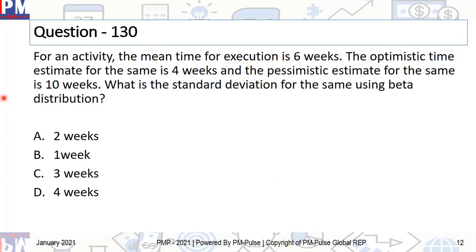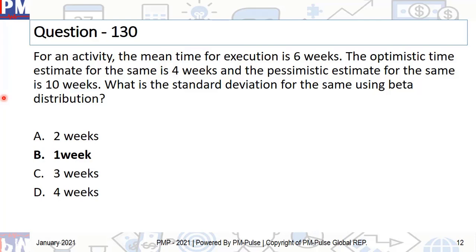Let's move on to question number 130. The correct answer is one week. The calculation is simple: in PMP, we use the beta distribution method for standard deviation, which is pessimistic minus optimistic divided by six. The longest duration here is 10 weeks, which is pessimistic; the shortest is 4 weeks, which is optimistic. So 10 minus 4 gives you 6, divided by 6 gives you 1. There you go — one week.